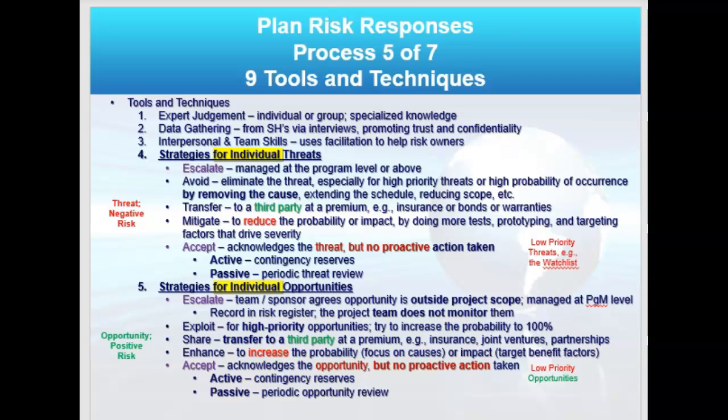Now for opportunities, I can exploit, right? I can try and increase the probability that it's going to happen. That is in essence like an avoiding in risk. It's exploiting. I can share the opportunity, which is like transferring for threats. In opportunities, I'm sharing with a third party, maybe a joint opportunity for business. And I can enhance, I can increase the probability or impact, which is the opposite of mitigate for threats.